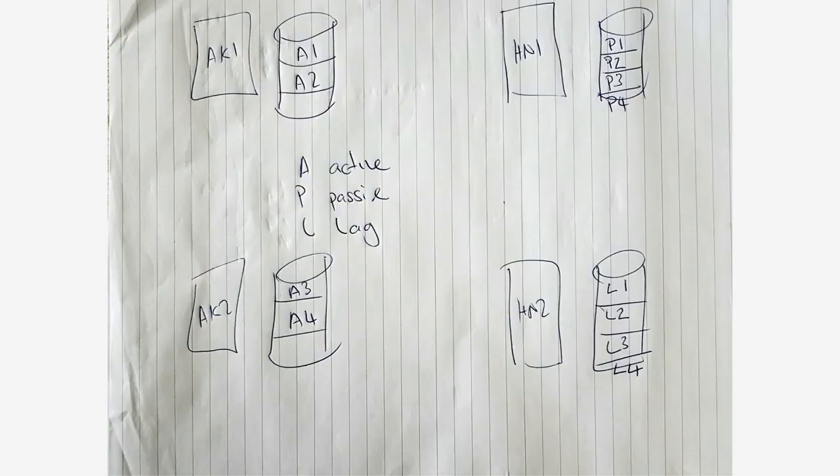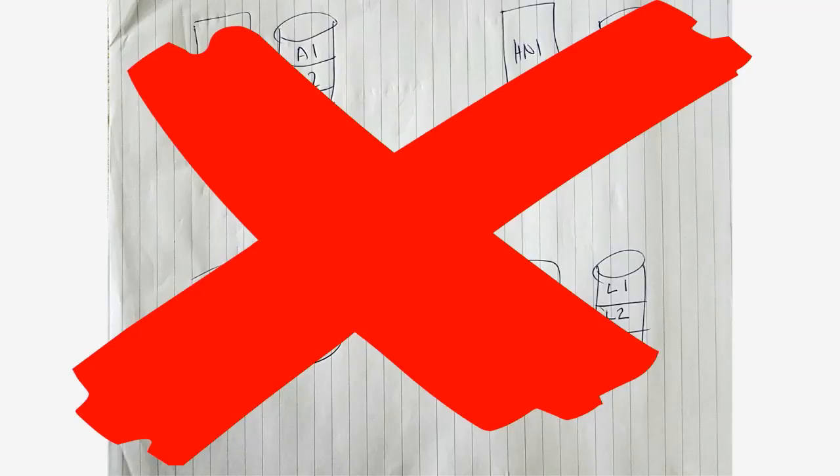So under Waterfall, we would have whinged and moaned about the scenario that we'd been given. We might have complained to our designer, but we wouldn't have made the changes to the config, because that's not what you do. You raise another project that would go in and make the config. But because Ops owns it, we were able to make those changes.